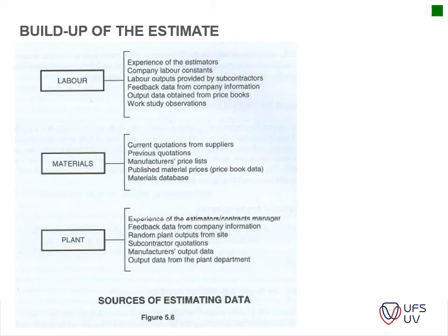So that is the building up of your estimate. Also a very important slide to know is your labor, the sources of estimating data. The accuracy of your rate build ups is influenced by the experience of your estimator and labor constraints. How much labor do you have? Do you have to outsource other labor to assist you to actually get the numbers on site? Labor outputs provided by the subcontractors: will they be able to actually do the work within the allotted time? And then feedback data from company information.